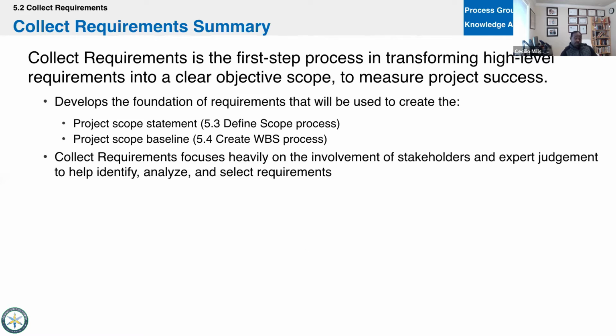All right, and then just remember that for PMI, a requirement is a condition or a capability that must be present in the finished product to satisfy a business need. This is the reason why earlier we talked about FDA or regulatory laws. Those aren't requirements; they're EEFs, because those things aren't necessarily required to create the product or to finish the project. They're just required to operate within that municipality or that AHJ. So that's the idea there. And PMI will be very explicit about that in their questions.